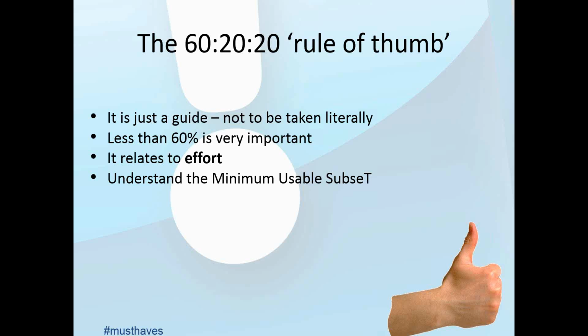Equally, if you've got a break of, say, 60-30-10, again, don't do anything. Don't contrive any of your priorities. You may want to challenge it and make sure that you have got 30% shoulds. By all means check that, but don't contrive and take a third of those shoulds and turn them into coulds just to get to a 60-20-20. The priority is the priority. You just play the actual breakdown as you find it.